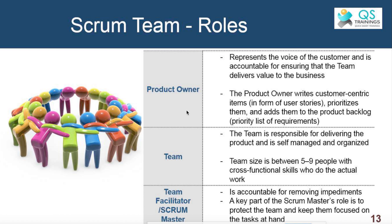The list of requirements is called a product backlog. The product backlog is like a list — whatever the product owner wants to be developed, he will put it into the product backlog. So if I am a product owner for YouTube, the first item in the product backlog would be the ability to upload videos on the site.